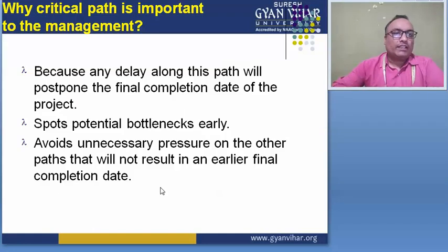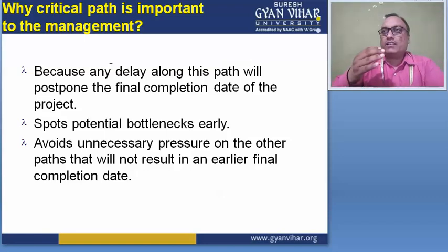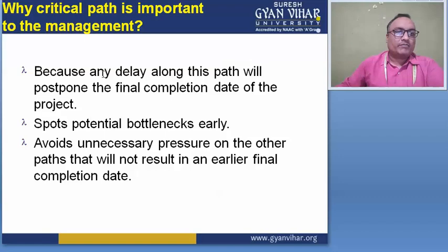Then why is the critical path method important to management? This gives the information about how much work is completed and how much work will remain, because any delay along this path will postpone the final completion date of the project. If there is any delay in your project, then you will postpone the date of the project.